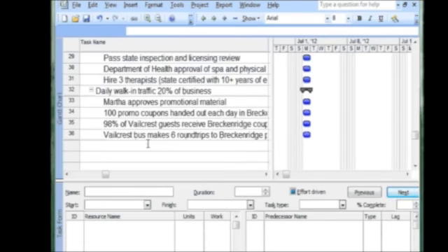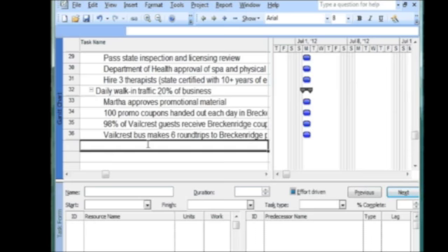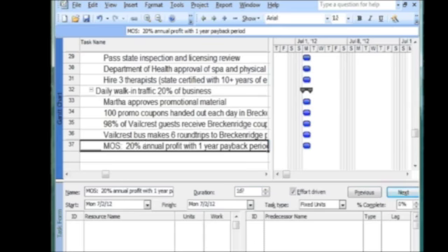And last, we have the MOS for the project as the last line of the plan. We indent it to the same amount as a high-level achievement. That's all there is to the data entry of the WBS. You probably noticed that by default in the software, every task is scheduled to start on the first day of the project. Later, as we build the plan and enter predecessors and resources, this layout will change.